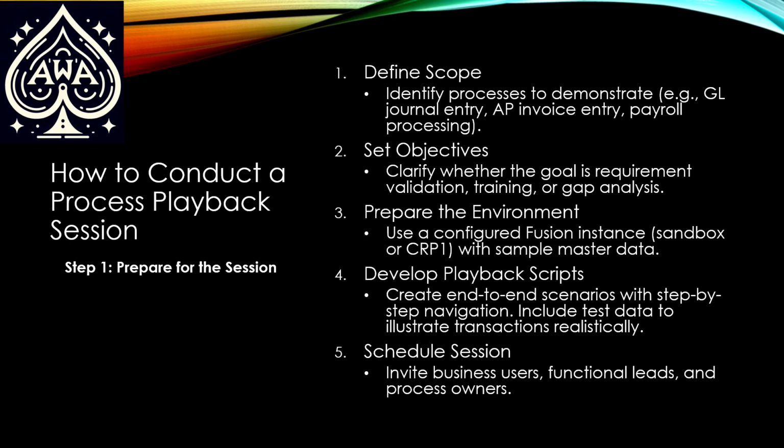So you've got to make sure that as you're preparing this environment, you're actually going in as Bob Requisitioner. Bob Requisitioner is a real requisitioner. If Bob Requisitioner submits a requisition, I know that Sally Approver is going to have to approve this. I need to have at least two users at that point. Bob Requisitioner to show the requisition, Sally Approver to go and approve it. And it's real people. And if I don't use Bob and I use Peter Requisitioner, it shouldn't go to Sally Approver. You've got to have all those scenarios in place. It can't just be, well, yes, I'm logged in as Casey Brown, and Casey can do everything. Got to use real folks out there.